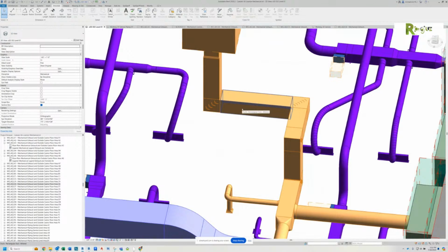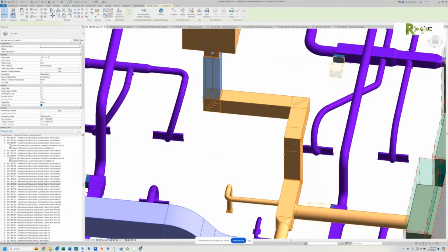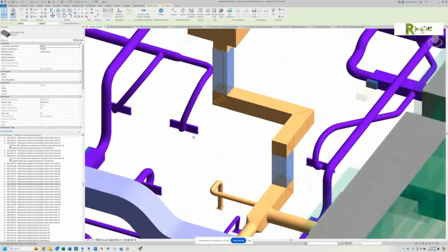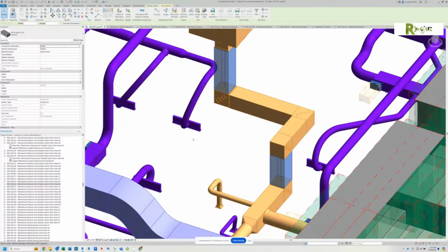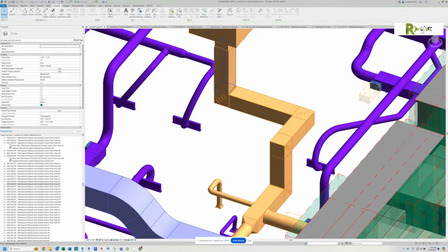Okay. So then I need to click on that and click on that. You're not going to get anything new fabricated. No, they're not going to fabricate new stuff. So what should I do with that? They're just going to cut that one, and they're going to cut a piece off. I don't need to highlight it or address it.